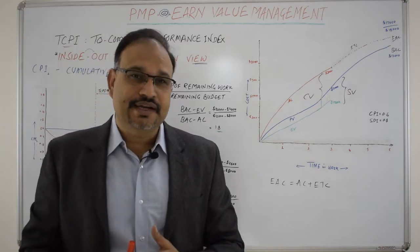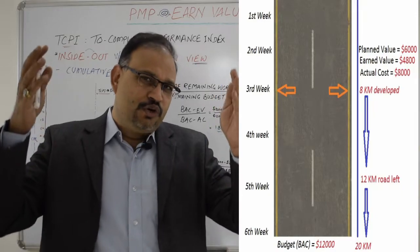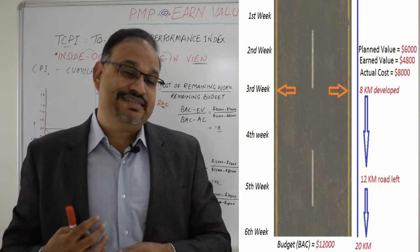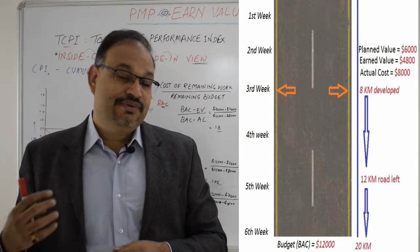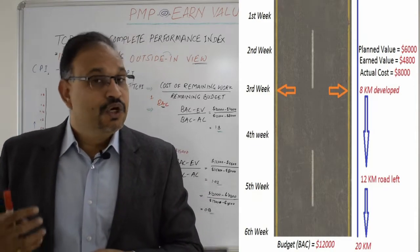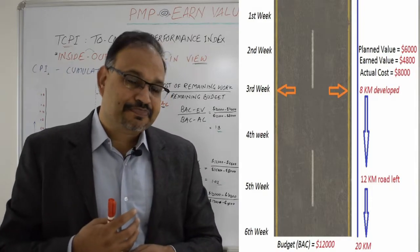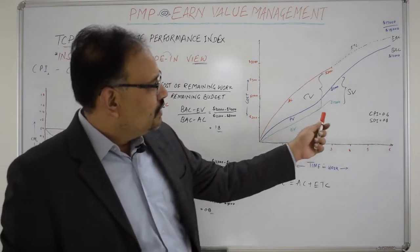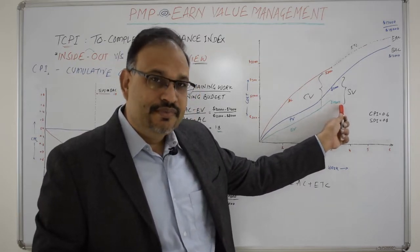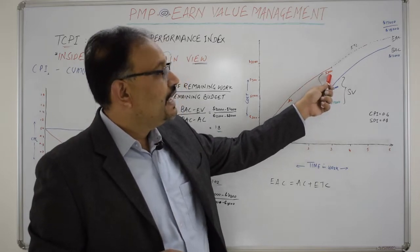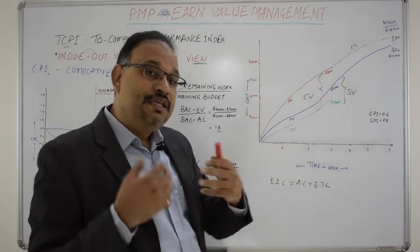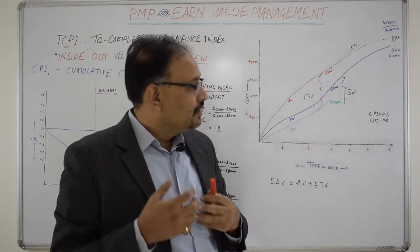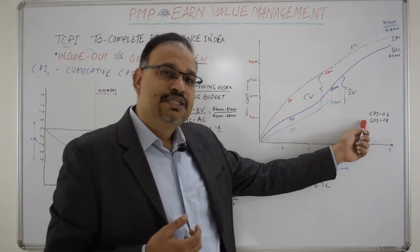As a quick recap: the project wants to build a 20-kilometer stretch of road in six weeks with a budget of $12,000. At the end of week three, the project has only completed 8 kilometers with an actual cost of $8,000, and 12 kilometers still remain. Earned value analysis shows the 8-kilometer stretch translates to an earned value of $4,800 against a planned value of $6,000, with actual cost of $8,000. CPI is 0.6 and SPI is 0.8, showing the project is lagging on both cost and schedule performance.